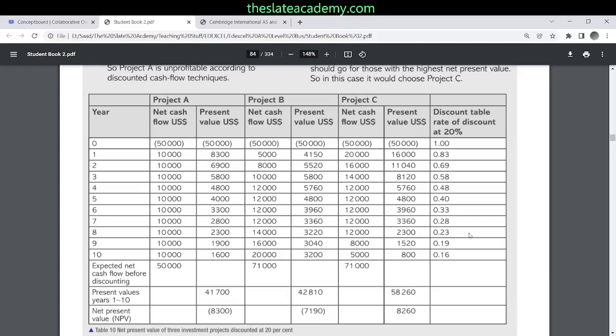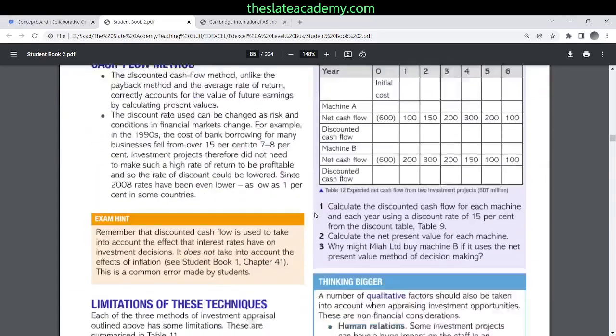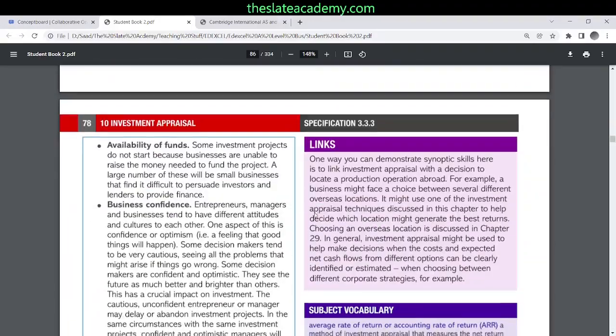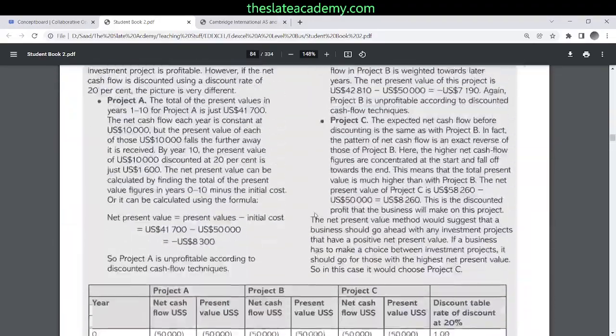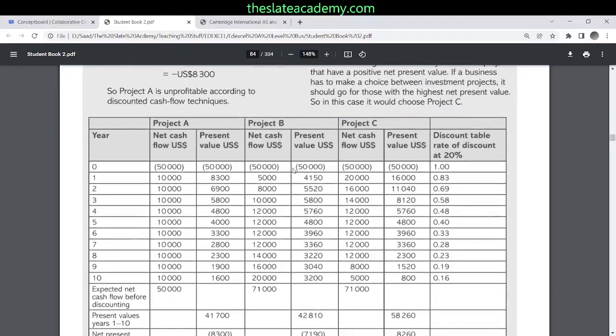Alright, so let's see if you could check these present values for project B and let me know if you get them right. Do you have a question on this one? They don't. You'll have to check these. These are called future values, the values which are given for the project: in year 1 I'll get this return, in year 2 I'll get this return, and so on. I have to discount them back to present, and in order to do that I have to multiply them with their relevant discount factor.